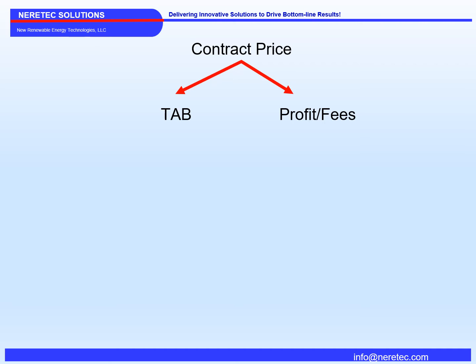Now, let's assume that you are also further down the road, and that you have had some overruns. If you add the overruns to the contract budget base, that would give you a new total allocated budget called over the target baseline. The target allocated budget can be broken down into two components.